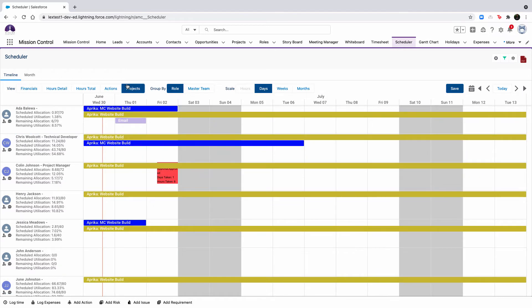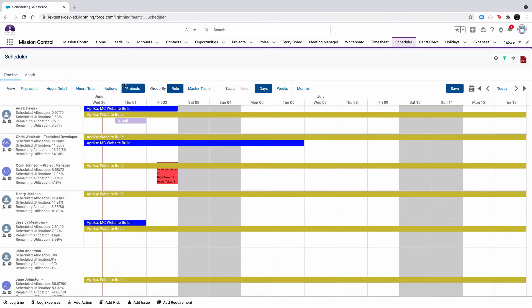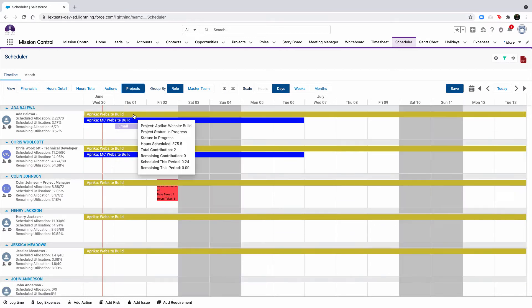Moving forward, let's take a look at the project view, which will provide a high-level summary view of work scheduled. Actions within the same project that are scheduled to occur on the same day or consecutive days will be grouped into one bar. This view is only available in the days, weeks, and months scale. You can also hover over the project bar for a few details on the project.